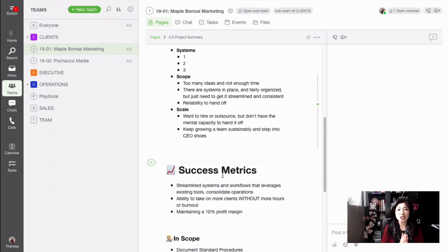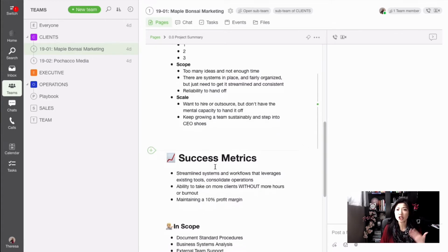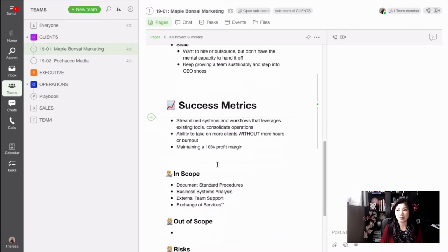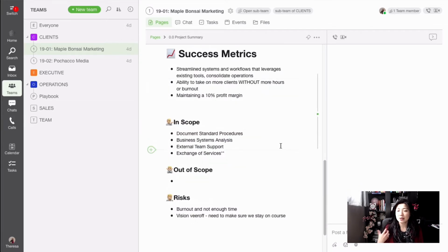Okay, I cannot stress enough about this point. Usually this is what creates and causes churn or rework, because there's so many things that were promised in order to close the sale, but then it fails to make it to the team. This creates friction for both the client and the fulfillment team, as now someone will either have to reach out to the client to level set and realign with the whole scope, or drop any other work that they may be involved in right now to beat the deadline to fulfill it. So make sure you're always capturing those necessary points. And then you can also include some of the success metrics if you find it's going to be valuable.